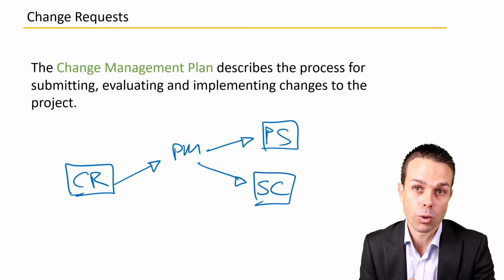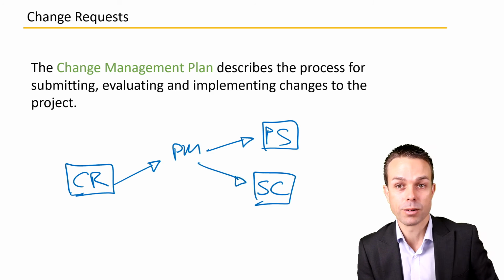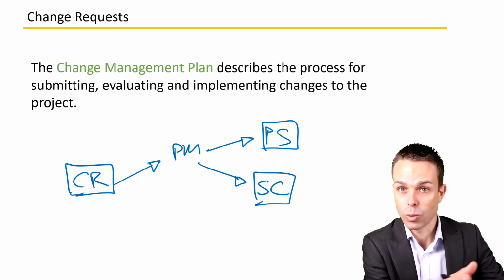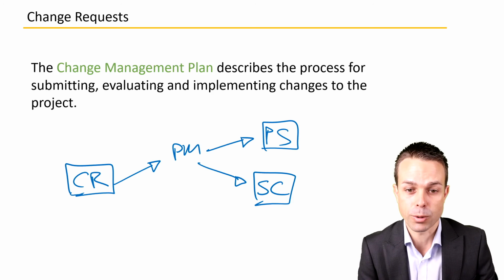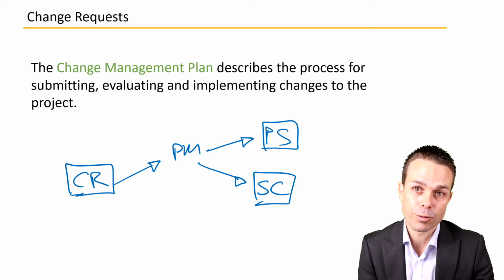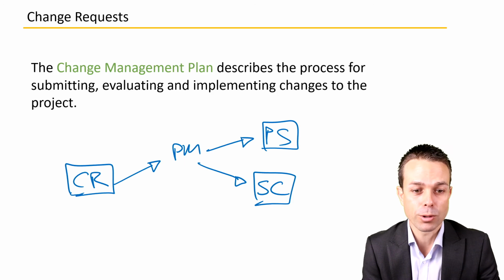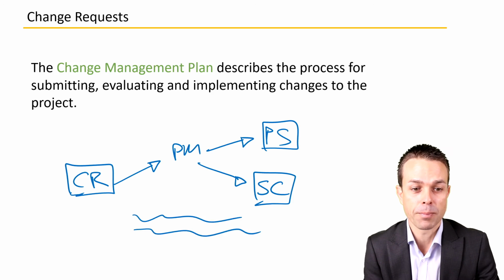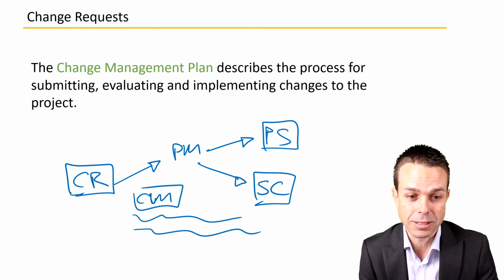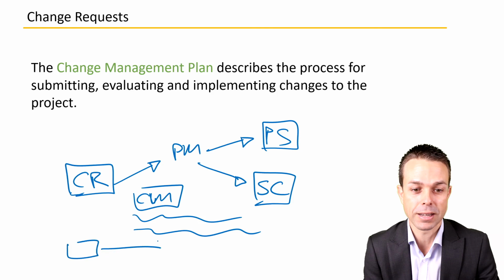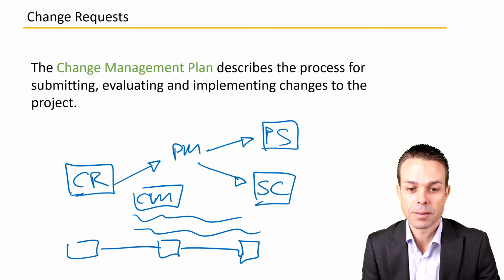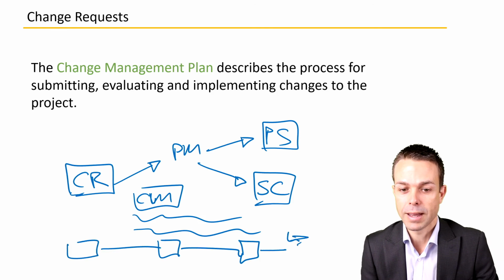Because if we're involving more money and more money needs to come from the project sponsor or a governing body or wherever it's actually coming from in this particular project, then that needs to be approved by those people. So what is the process? And that can just be a few lines in your project management plan noted as a change management process, or it can be a complete document outlining, it's going here, it's going here, it's going here, here are the people, and here's the process, and here is the outcome.